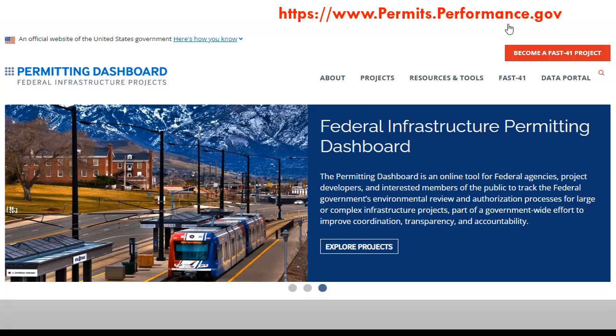Once we've received a set of plan sheets and the preferred alternative has been chosen, there's usually a draft document ready, like the draft environmental impact statement. Once we have that information, that's when we try to go out with our public notice, which is still relatively early in the permitting process. And that's just to, again, go out for questions or concerns regarding navigation. We will send any questions regarding the environment directly to the lead federal agency for them to handle. But we try to get everything done as far as our public involvement ahead of time.